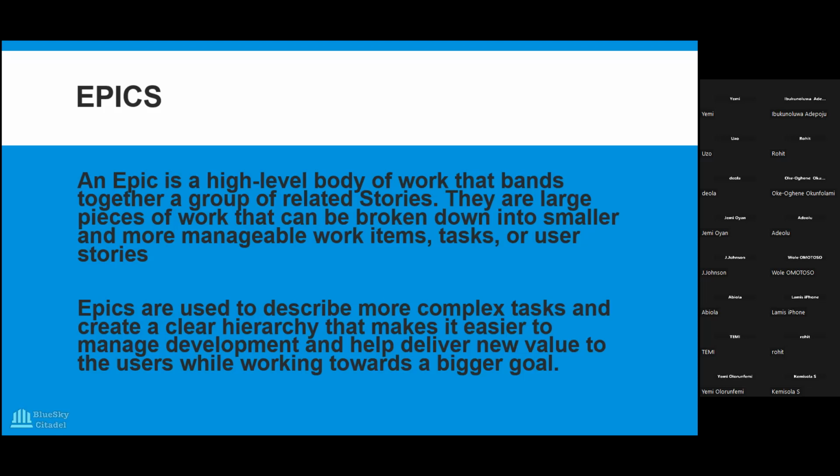of related user stories. So for example, if you were doing a project, let's say you're trying to build a house, right? In order to build the house, you know that there'll be different components, phases of work, or activities that will be carried out before that house will be seen to have been completed. Now, we can say that building the house can be the epic. Building the house is the epic, and then you can break it down to fitting the kitchen, leveling, things like the initial work.